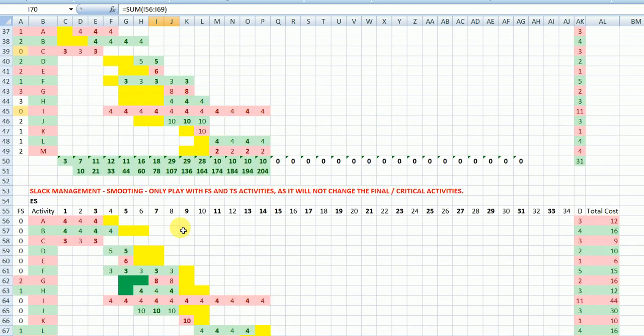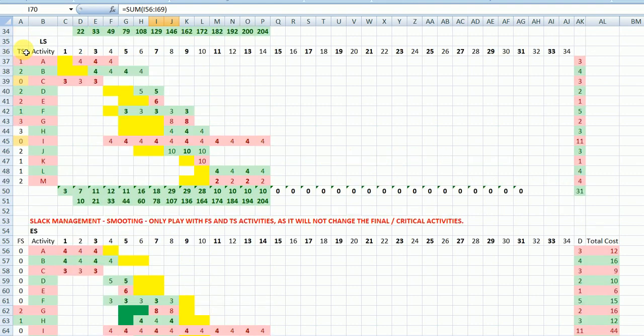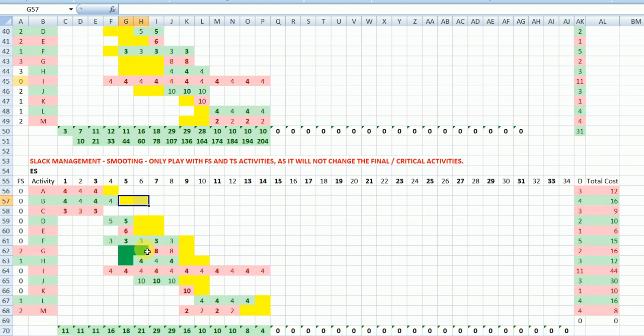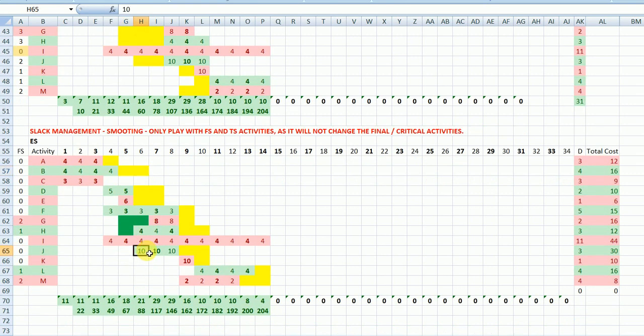So then I go to my total slack. In the sense of total slack, this yellow part which is here now, I can move this. What I would generally be looking for is, see the peak, where is it? I think my 10 is giving me a hit here because of this 10. So I have the ability to move it, how many, 1, 2, yeah. I can move this 2 days towards the right. I put this as green, so I moved it.